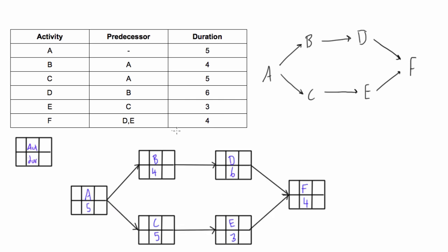Now the point is to introduce the concept of early start and early finish. We denote early start with capital ES and early finish with capital EF. I'll be writing them on the top left and top right corners for each activity. Early start is just the earliest any activity can start, providing there's been no changes to the schedule or any delays in preceding activities. Early finish is the earliest any given activity can finish based on our scheduling, again assuming nothing has changed.